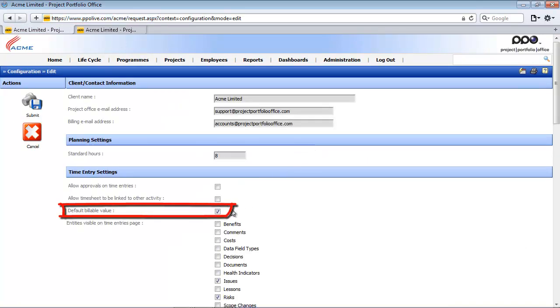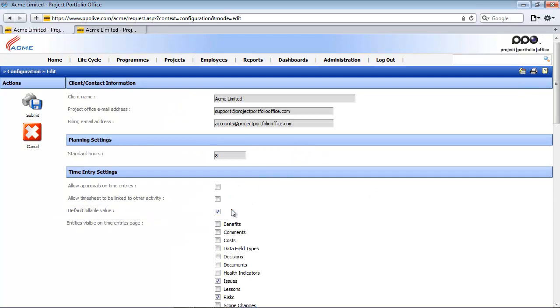If I return to the first tab and access the system configuration again, the third setting is then shown. The third option shows the global default for the billable field. The system administrator can specify whether the default option for all the time entries should be billable or non-billable. So if it's checked it's billable, if it's unchecked it's non-billable.